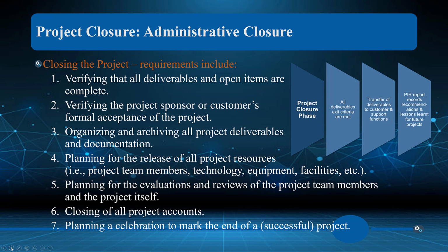So closing the project means verifying that all deliverables and open items are complete, verifying the project sponsor and customers accept what we've done, and organizing and archiving all project deliverables and documentation, again, so that other projects can go back and look at that. A lot of times when we create IT systems, we're constantly working on them. Some even say that 80% of all coding work is done in the maintenance phase, in finding bugs, securing bugs, fixing things, doing improvements, doing updates versus upgrades, etc.